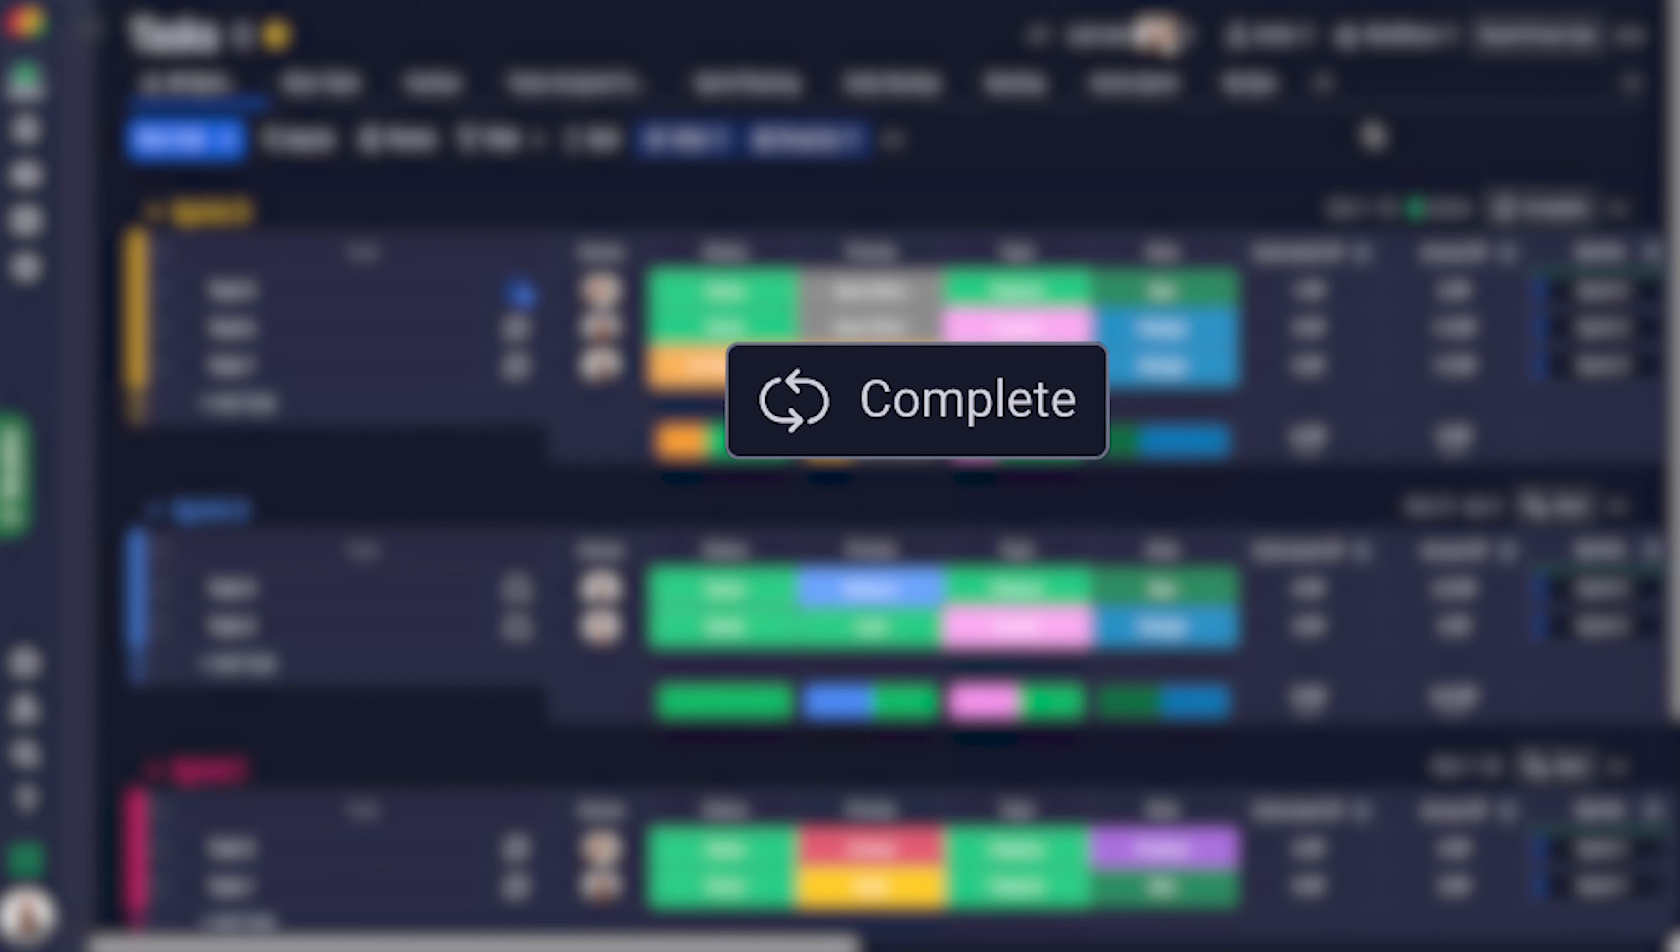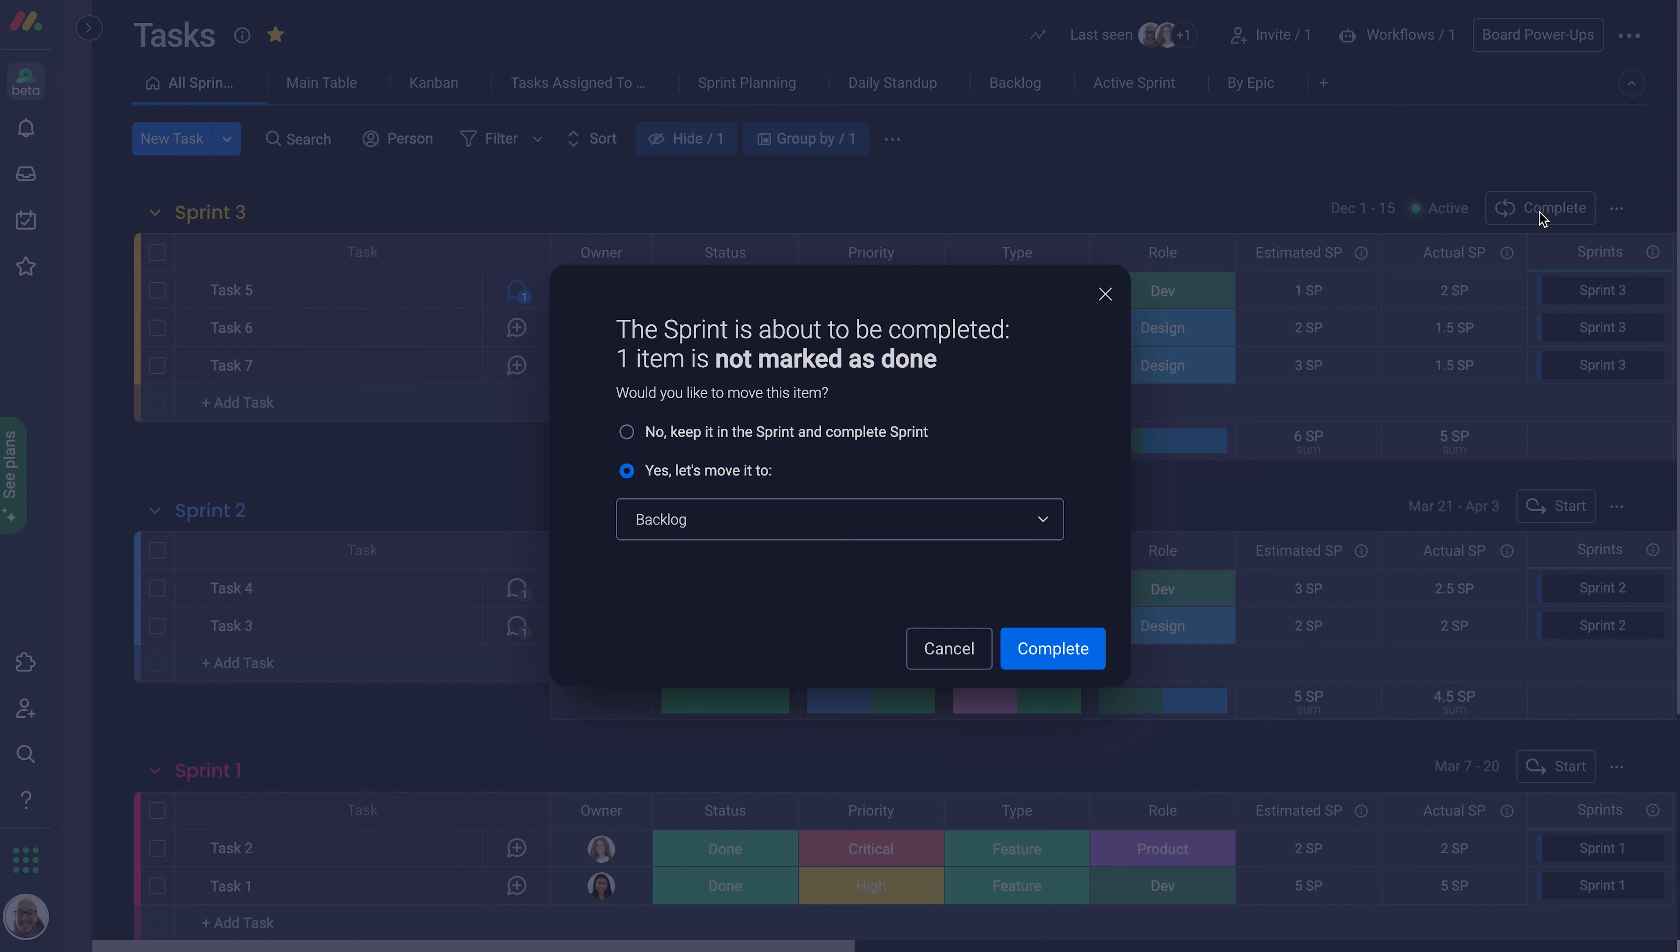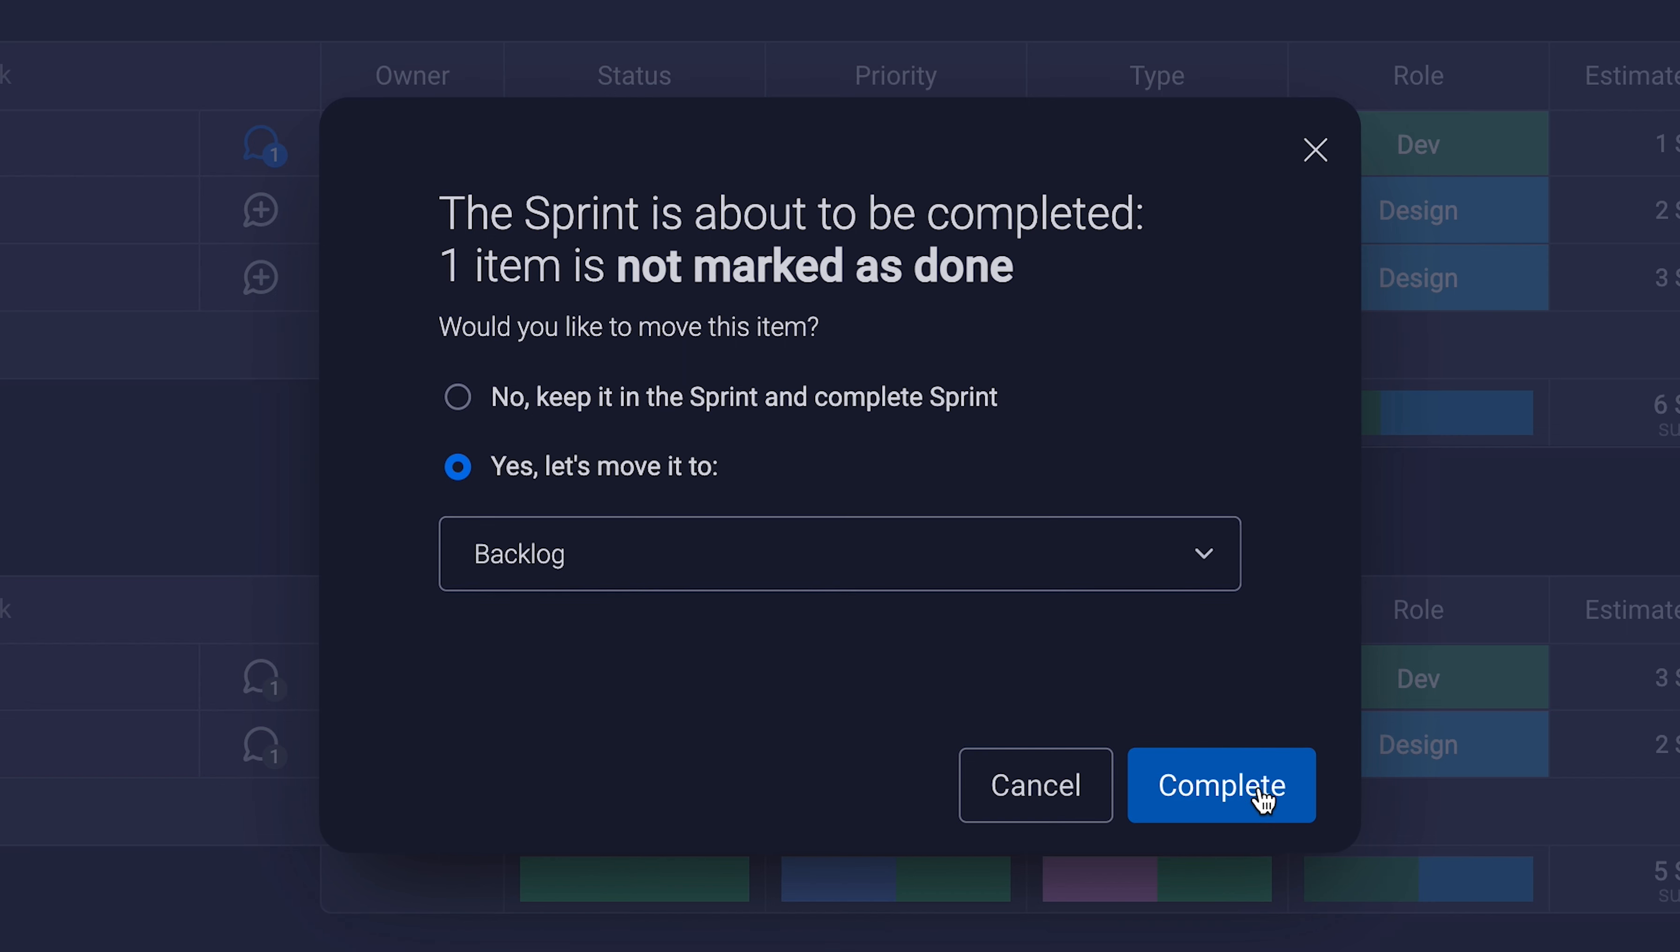When you've arrived at the end of a sprint, click the complete button to mark it done and remove the active indication. Here if there are any incomplete tasks, there will be an option to keep them in the completed sprint or move them to another group. Seamless.